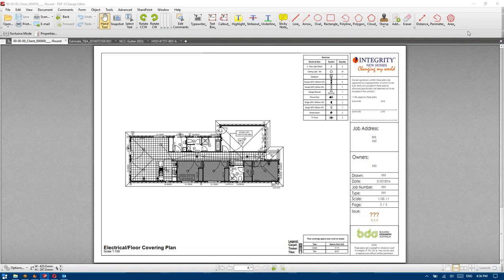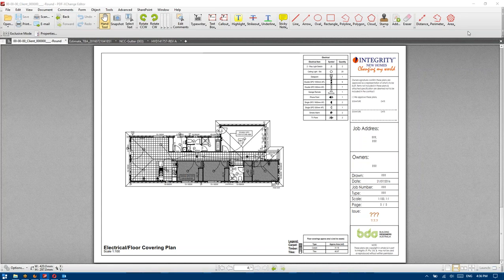I also have this other one in my arsenal — it's called rubbish. So a perfect example is on this one here — we overlooked the implications. This is a very old job, and when this job finally came out of council and went time for construction, the code had changed, which is what necessitated this report. And as you can see, all the downpipes had to go to 100mm. Now that may seem very minor, but depending on your roof area and the number of downpipes, it adds up — there could be $10, $20, $30 extra a pipe and you add two or three extras and you're fighting for your margin straight away.